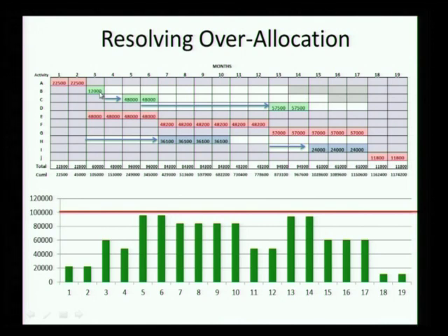Now a solution which says B by 0, C by 0, would that give an acceptable result? I bring C back here. Yes, it would also give an acceptable result. C by 0 and D by the same amount, H by the same amount, I by the same amount would also give an acceptable result. So that is the more advanced area of looking at resources, optimizing resource allocation.